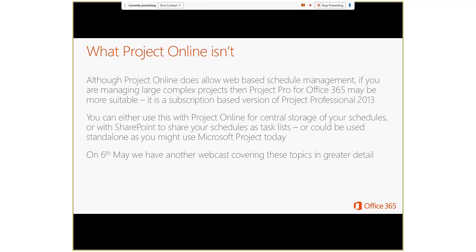And that's no different really to Excel. I mean, the Excel web app is fantastic, but if you're doing some financial analysis and have huge models that you're working on, you're probably going to be using the Excel desktop app, even the 64-bit version, to get the best experience. No different from Project. If you're doing some sort of complex leveling, thousands of tasks, hundreds of resources, you're going to be using Project Professional, Project Pro for Office 365 in the subscription form, rather than using the web schedule.